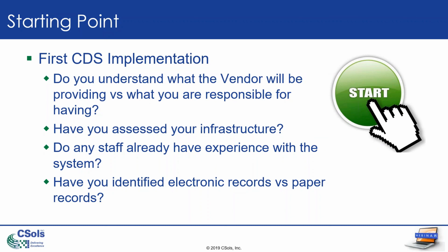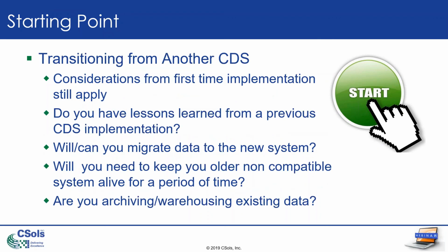So sometimes it's easy to say, well, we're going from paper to electronic, so everything's going to be electronic. And if you don't take the time up front to understand what can and can't be, then you might run into it down the road when you start getting into the testing aspect, or looking into it a little closer and realize that maybe some things you do need to keep on paper. So making that assessment and looking into that up front is critical.